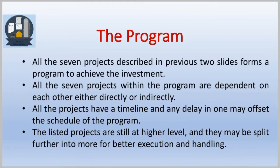The listed seven projects are still at a higher level and they may be split further into more projects for better execution and handling. Examples of such splits may include one project for the refinery expansion, one project each for each new refinery, and more than one project for pipelines.